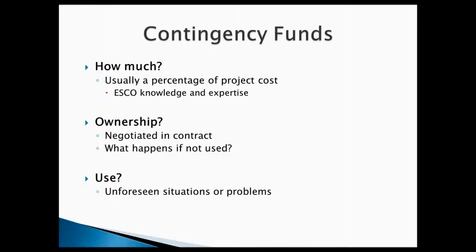Okay, Rob. Okay. Contingency funds are an allotted amount of money to be used in the contract, and the ESCOs are really good about knowing this. They have the experience. How much should the contingency funds be? They've done a lot of projects. It's usually a percentage of the project cost. They're pretty good at figuring out what it should be.